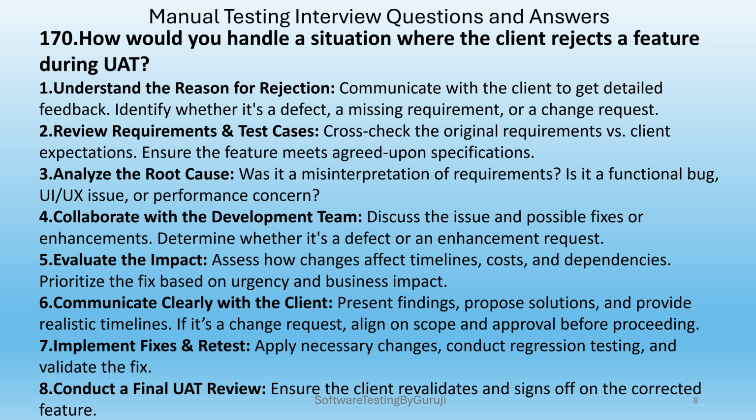Fifth, evaluate the impact. Assess how changes affect timelines, cost, and dependencies. Prioritize the fix based on urgency and business impact. Sixth, communicate clearly with the client. Present findings, propose solutions, and provide realistic timelines. If it's a change request, align on scope and approval before proceeding.